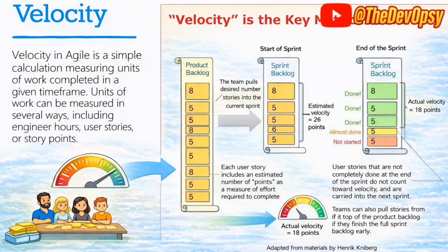So when you start the sprint, you need to understand what the velocity is, how many people are there, how many people can do what kind of work, etc. And there are tools associated with it. When we work with Azure DevOps Boards, we'll understand how we do capacity management of people with respect to velocity. It should not be the case that you estimate 26 points, and your team is actually capable of delivering 50 points, but people are sitting idle, right?